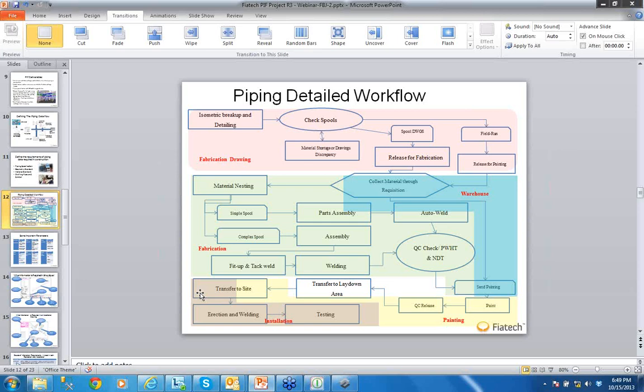One of these projects was in Kazakhstan and the other 2 were in the United Arab Emirates. In these 3 projects, we achieved results better than similar projects within the company. In the one in Kazakhstan, we achieved 1.2, in other words, a 20% improvement in productivity.